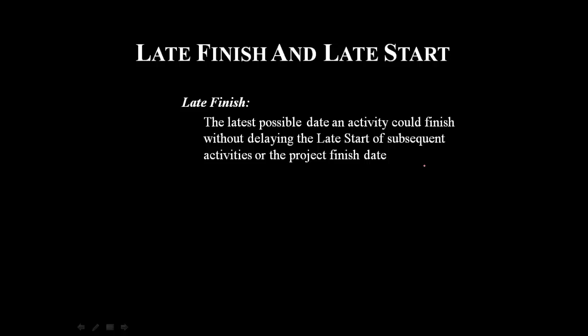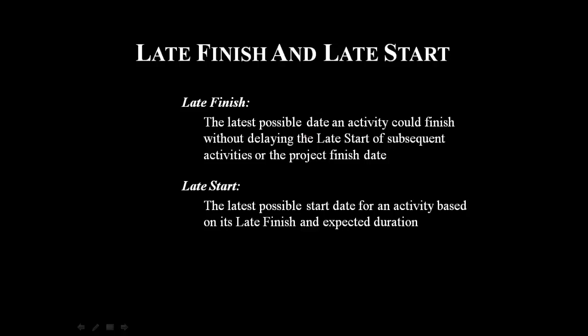Now let's go to late start and late finish. So what is a late finish? The latest possible date an activity could finish without delaying the late start of the subsequent activity or the project finish date. We would just want to make sure that the late start of the next activity is not delayed, and also the project finish date is not delayed. Similarly, late start is the latest possible start date for an activity based on its late finish and expected duration.